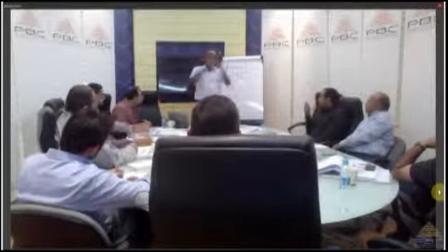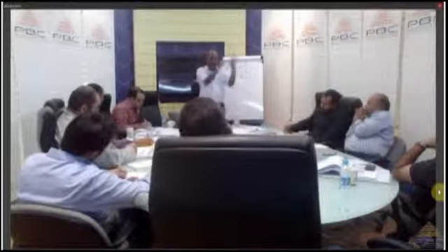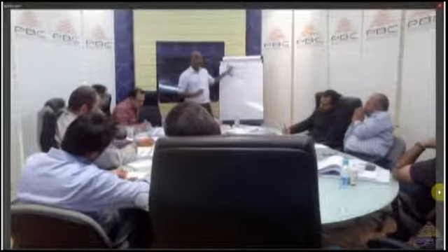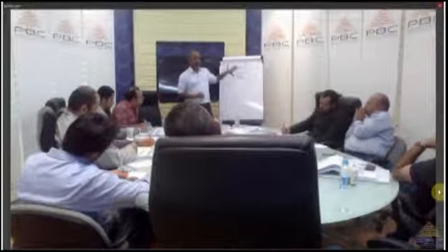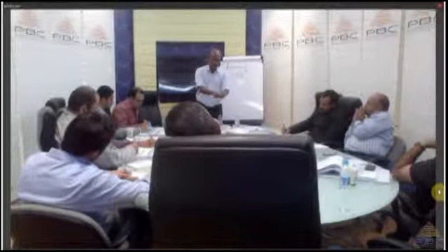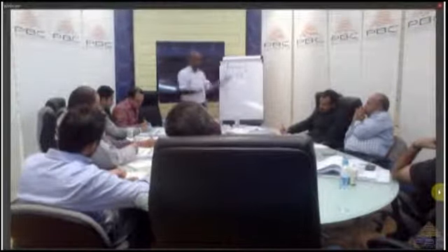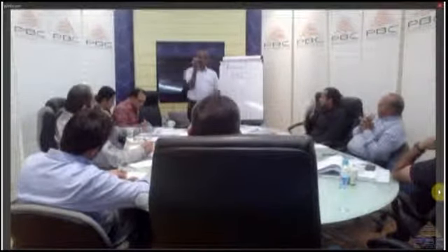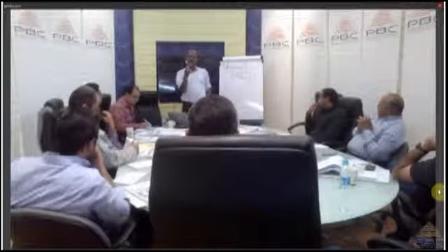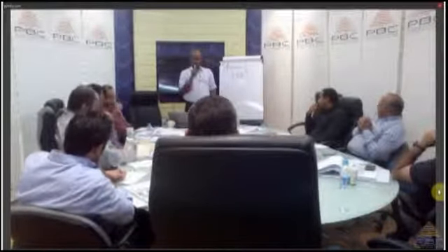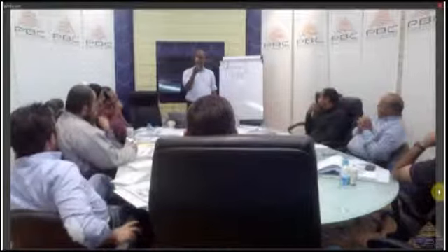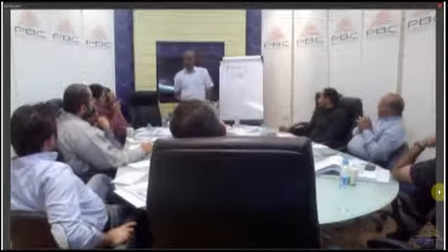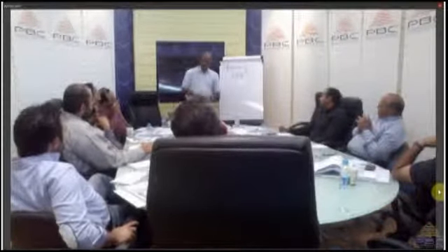So for your quality management plan, you will apply this logic. What's the benefit of spending that much money on quality versus the benefit I will get? Let's say for the whole year I kept on producing faulty markers. What is the cost to my business?